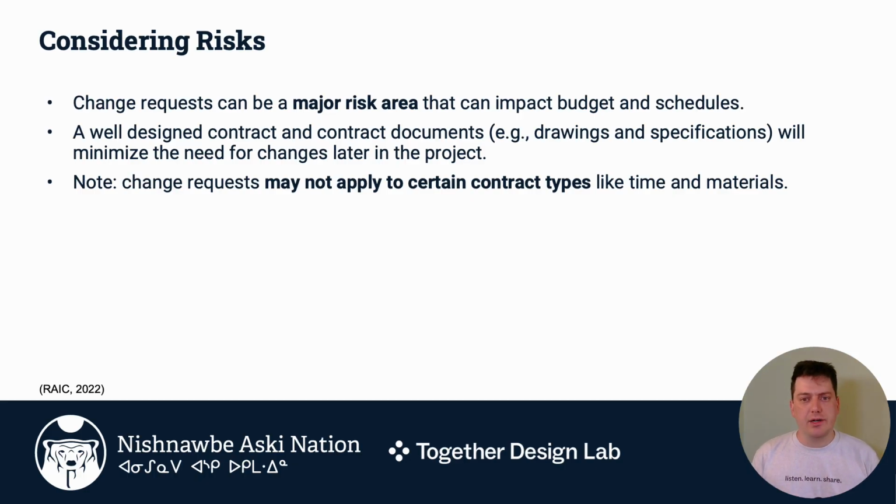You should consider during a project that there will always be some changes that happen along the way. And if you've taken our project management course, you'll remember that we often stress the need for flexibility. Having said that, in general, a well-designed contract and contract documents, so things like the construction drawings and specifications being very detailed, minimizes the need for changes, or what you might call the risk for changes.